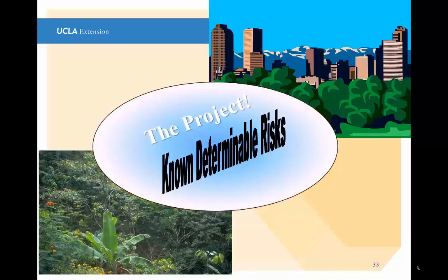In other words, we can determine what these risks are and we can evaluate them, like a key person leaving, or the fact that we expect certain results out of some testing that goes on and we don't get those results, or we find out that we need some deliveries from a vendor, and what's the risk the vendor is going to be late, or consultants. A lot of the risks, these are the risks that occur and can develop within the project, and these are risks we need to identify and assess the impact of and figure out what we're going to do about them.